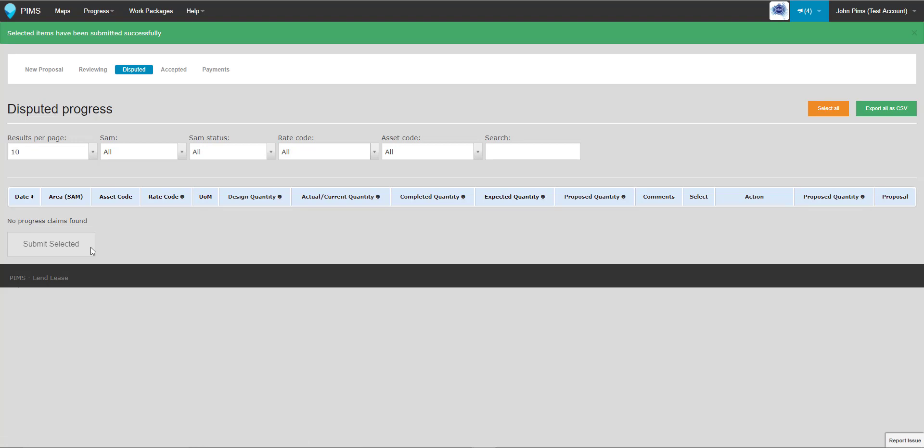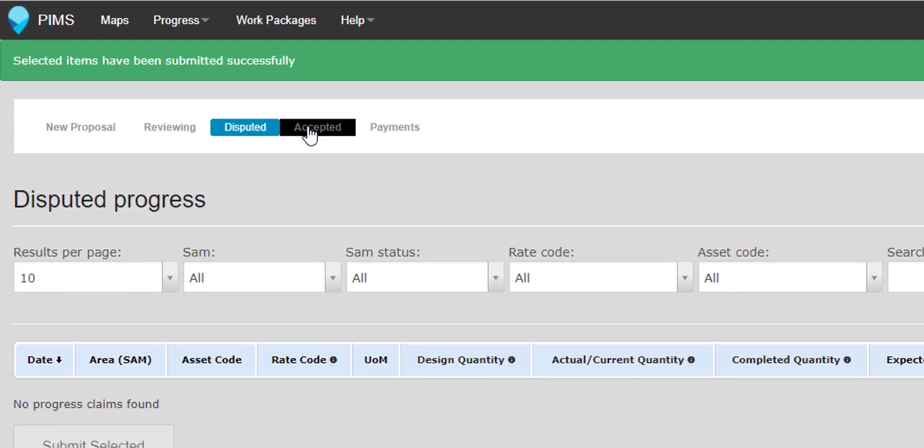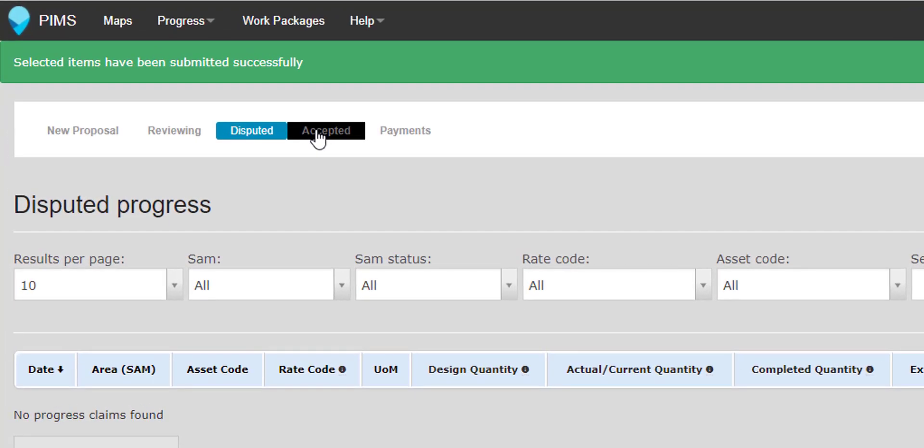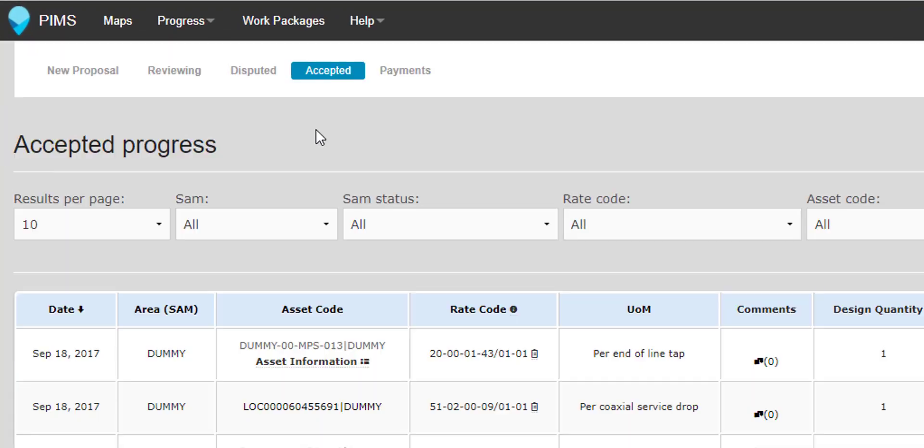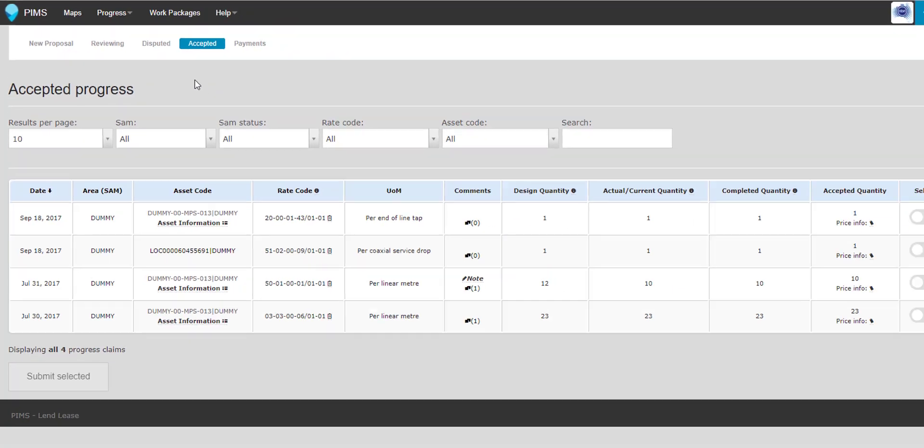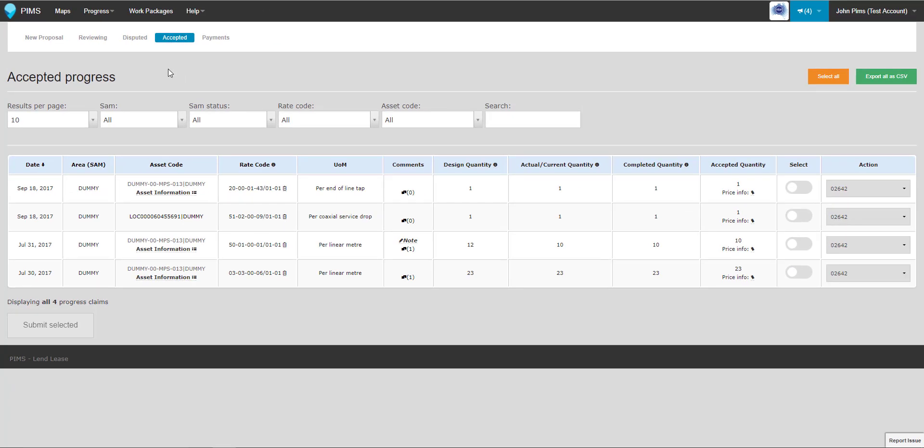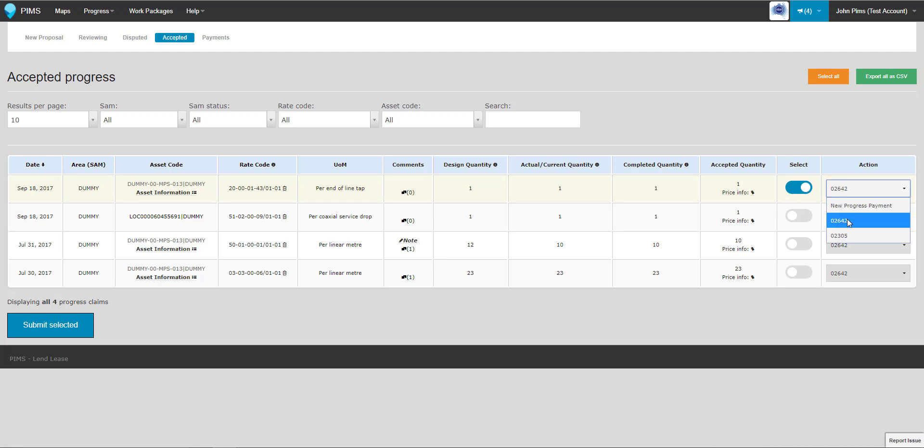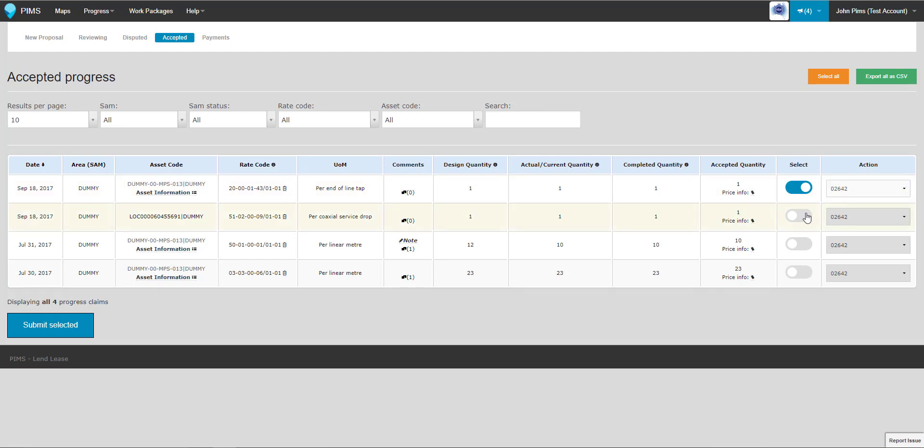Progress reviewed and approved by Lendlease staff will enter the Accepted state. On this page, you or an administrative member of your company can select the progress and add it to an existing draft payment claim, or create a new progress payment claim containing it.